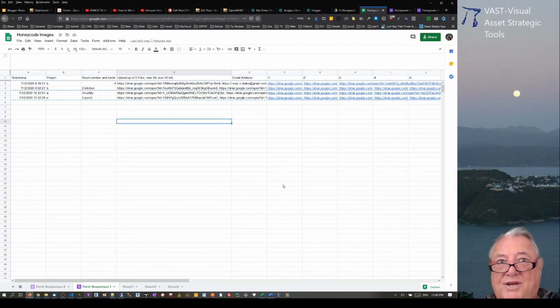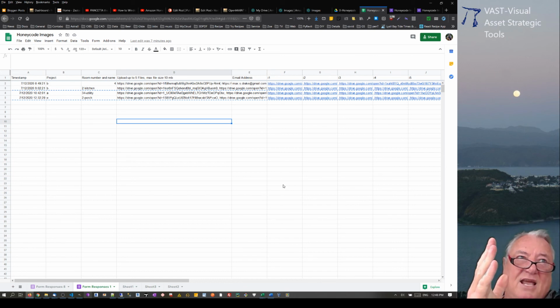When somebody repaired that defect, they would have a little switch to say, yes, that defect is fixed now, so that would then be put on the list for somebody to go around and inspect and confirm. Sometimes the architects and the engineers would identify defects and give them to the project manager, who would distribute them amongst his team.